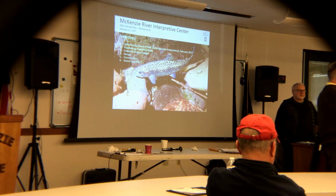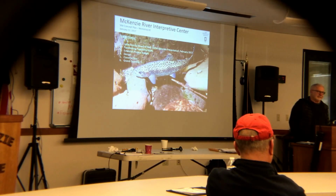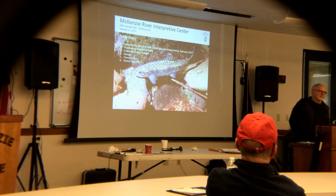We have used, on average, figures that 3% a year is kind of an average 21st century inflation rate. Oftentimes, at this stage of the game, particularly when we work with more of the financial side of consulting around this, they generally recommend just saying inflation isn't included because it's so variable. But if you are in a fundraising mode and you have a target date, and you're trying to say how much money do we need to raise? Yes, you need to think about that.